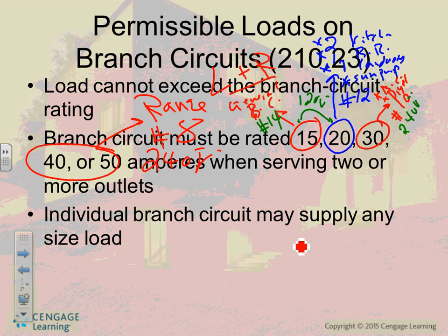I have a question on one of the chapter questions. Like, who is to supply and furnish the range? The owner. As an electrical contractor, do they require you to buy the range? Think about it. I know you don't know, but typically, that's the mechanical equipment guys who supply any mechanical equipment or owner equipment. The contractor tries to give them a package deal or buy everything. I hear you. One person. But typically, the owner equipment and the mechanical equipment are supplied by either the owner or the mechanical engineer.